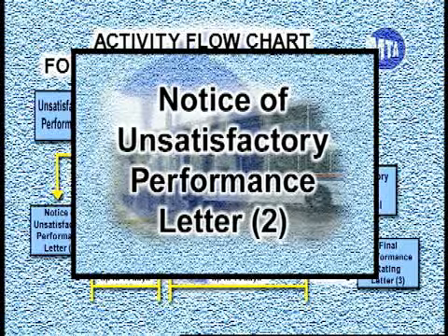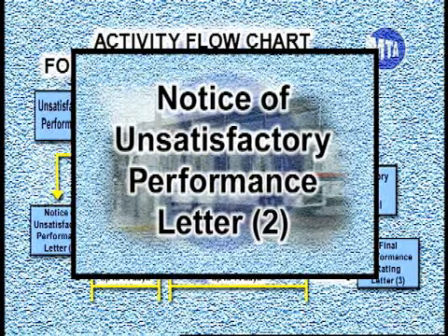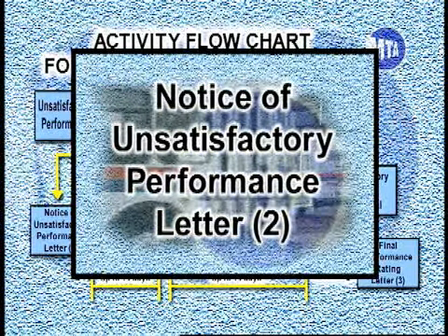Deficiency notice number 2. The contractor must be sent a notice of intent to give a less than satisfactory rating. The contractor must be informed of the basis for the less than satisfactory rating and is to be given 14 calendar days to request a hearing or to respond in writing, at the discretion of the program manager, to the factual aspects of the evaluation, not the rating itself.